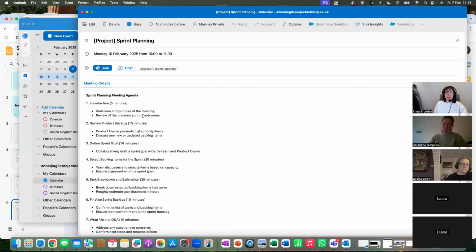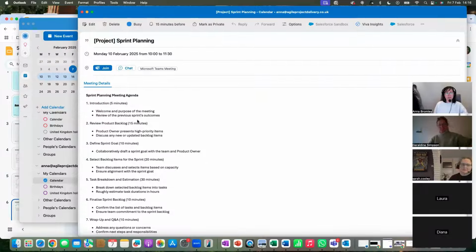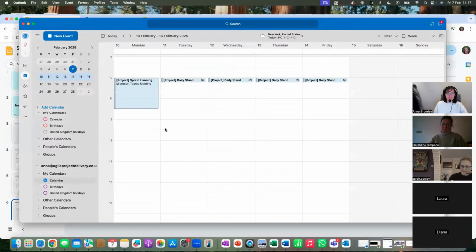Generally, on team sizes, I always think a team should be able to share two pizzas. That's the way I've always thought about it or learnt it. You should never have like 20 people, for example, in a sprint planning meeting because it's probably going to be very ineffective. So I personally find teams that are 4 to 7 or 8 are ideal. 8 is probably getting on the higher end of things. So yeah, that's the sprint planning meeting.